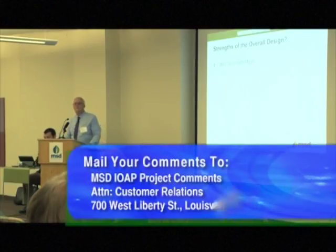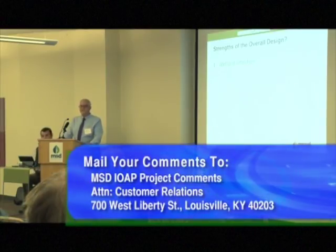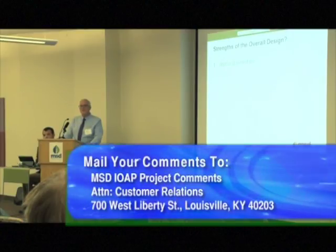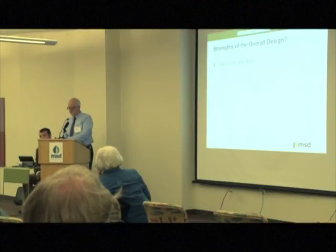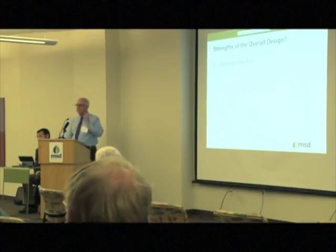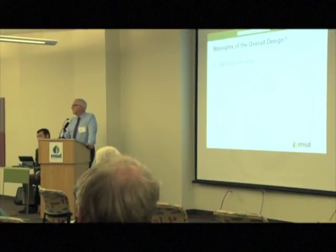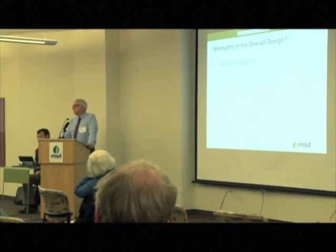Anything else? Yes, sir? Will the old trail remain open? Yes. It'd just be an alternative, somebody could take a different route if they chose to. It will be temporarily closed though for construction. There will be times that it will be closed. When contractors are selected and have come up with their schedule and construction phasing, we'll reach out, and there'll be signage letting people know we won't have people going down the hill. During construction, there may be some times, and we'll have signage, we'll have our public meeting ahead of time, so we'll have communications as we're going through the construction as well.